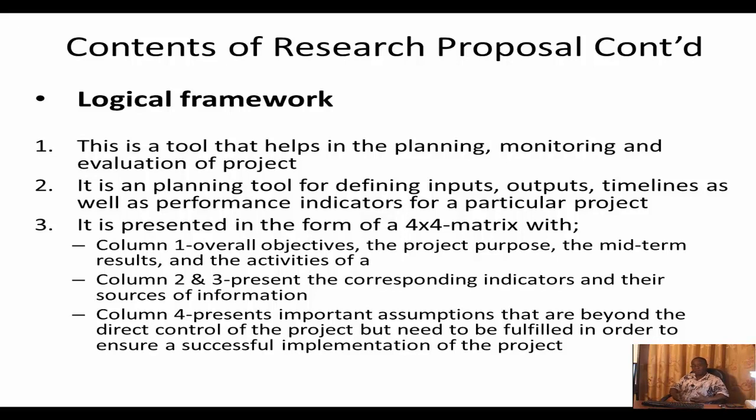And then there's a column 4 that presents the important assumptions that are beyond the direct control of the project, but need to be fulfilled in order to ensure a successful implementation of the project. Just the example I gave now about wanting to study the rate of failure.